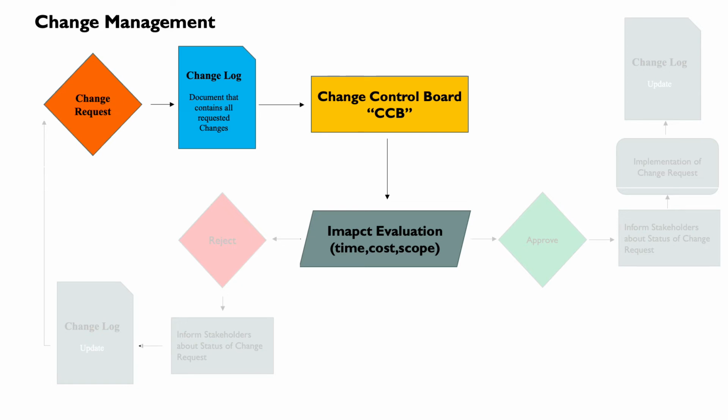For example, the change request sounds like: I want to compress the project duration from 12 to 8 months, with a clearly specified description of why we need to compress the schedule, what the business need is, and the impact if we do not launch in 8 months. And in this case, as a result, human resources says, for example, we can find some additional people to make it within 8 months, but we need $4,000 for that. The financial department says this risk was predicted. However, the reserve for this risk is only $2,000.